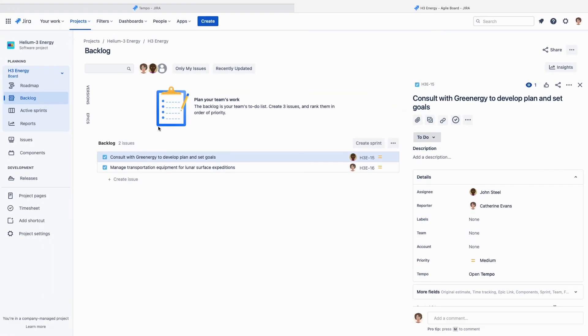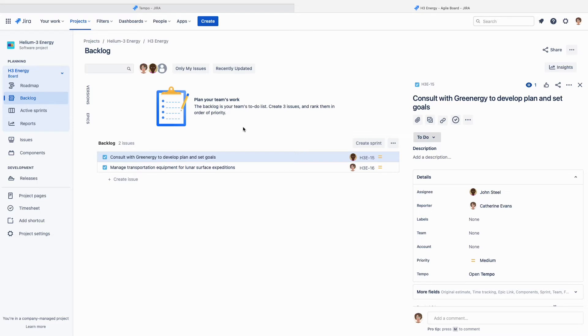The first thing I'll do in the project is make this account the default one to use for this Jira project, so all new issues created in it automatically have the correct account set. You don't have to set the default, but it does make things easier for logging time later on, and there's less chance of choosing the wrong account when there are multiple accounts linked to a project.